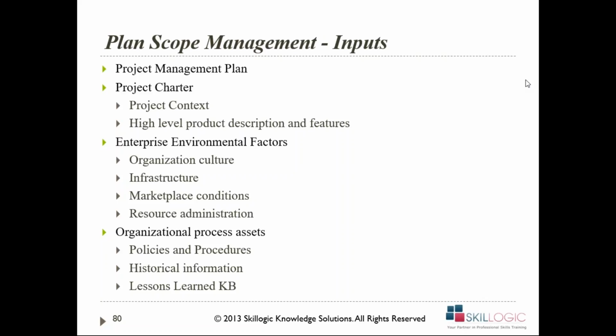What are the other common inputs for any of the processes that we have? We discussed this earlier. One is the enterprise environmental factor: the enterprise factor and the environmental factor. Environmental factor is anything which governs me to do a project from the environment perspective, and second is from the enterprise perspective. What could be the environmental perspective? It could be the taxation law of the land, any law of the land. For example, if you're doing a pharmaceutical project, the same example which we took earlier, imagine the salt being banned, the salt which is a very important ingredient in your medicine. If it's banned in that land, you just cannot do the project in that location, right? That is your environmental factor.